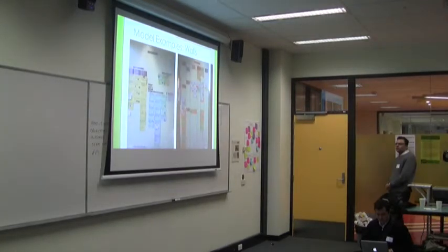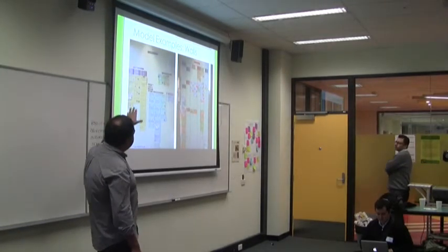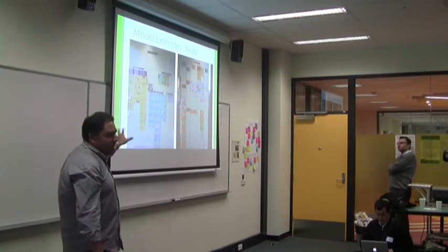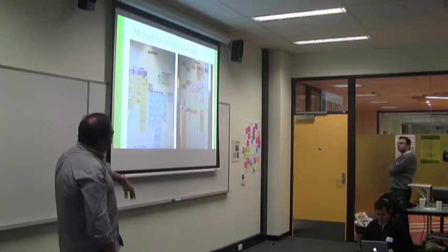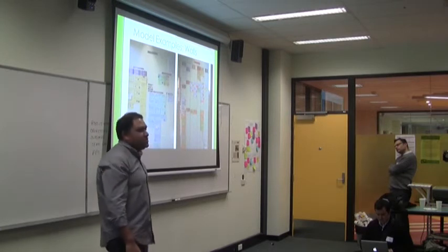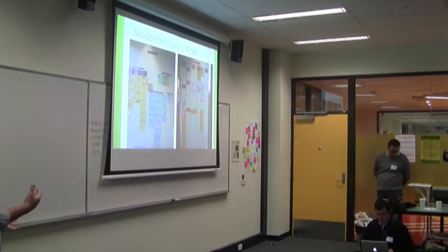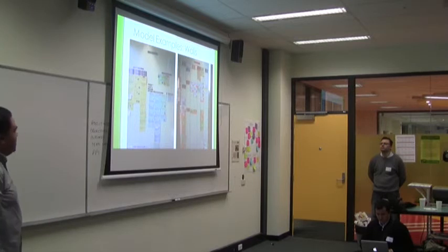So here, this is when we first started the project. I put these tech tasks up just to do doing data, no estimates on them. And this is where I allowed multiple avatars. I'll talk about avatars later. We had the tech backlog. We were doing a very technical piece of work. And then I had this ongoing tasks, which was a percentage of overhead. And our tech lead was dealing with his manager, and it was 50% of his time. And I said, let's make it visible, so then we can have a conversation about why she's chewing up so much of his time.